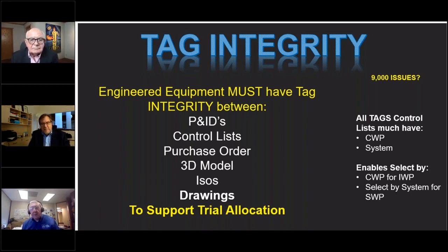A lot of it has to be done virtually, and that's fine. We got very good at that. Those guys can sit out at the plant and we can run the model from back here and do it virtually. We also have a lot of technology where, if it's an existing plant, we bring in the laser scans and blend those into the model, so that in the reality capture scenario you can see here's the new stuff, here's the old stuff, here's how it's going together, here's how it fits, here's what needs to be removed. So there are a lot of tools in our box that we can use to manage that detailed design.